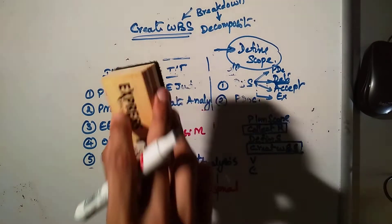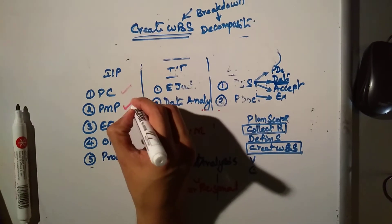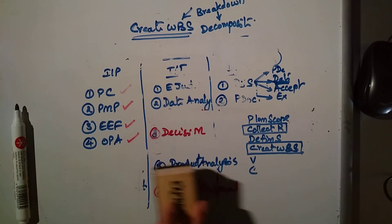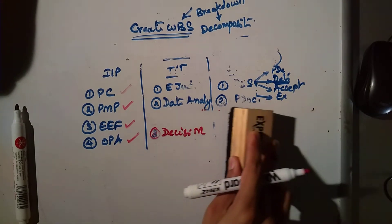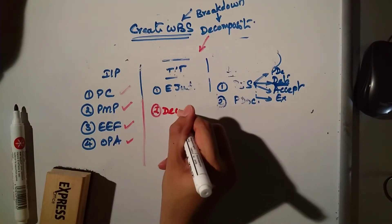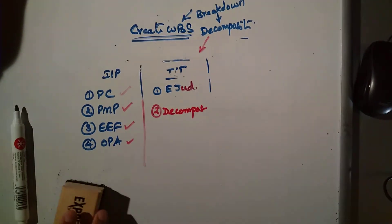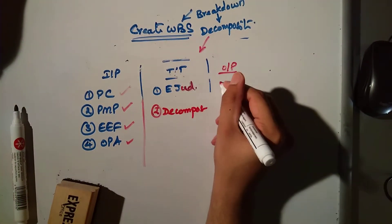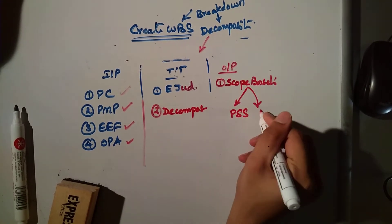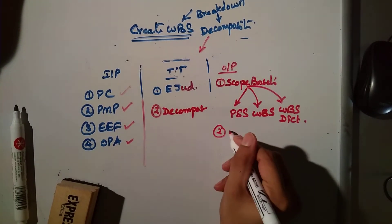In Create WBS, the inputs are project charter, project management plan, EEF, and OPI. We don't want project documents here. For tools and techniques, we don't want interpersonal skills, product analysis, decision making — what we said is decomposition, and the first tool is expert judgment. The output is the scope baseline, which is formed of the project scope statement, WBS, and WBS dictionary, plus project documents update.